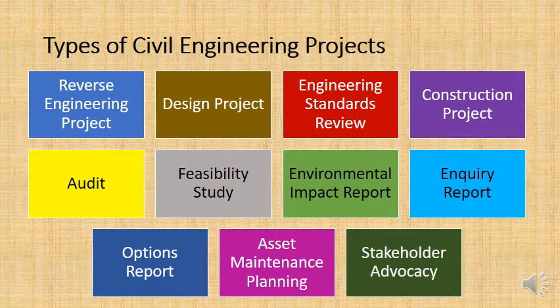So a very famous inquiry was called the Fraser Report, and this was an inquiry into the Scottish Parliament building. It was built in the late 90s, and it was built for hundreds of millions of dollars, and it's a very small building. It's not much bigger than the Parliament building in Kurdistan. It shouldn't have cost $100 million. And who had to pay for that? The taxpayers. So everyone was furious, and there was pressure on the government. So the government said, we need to launch an inquiry to find out why it costs so much.